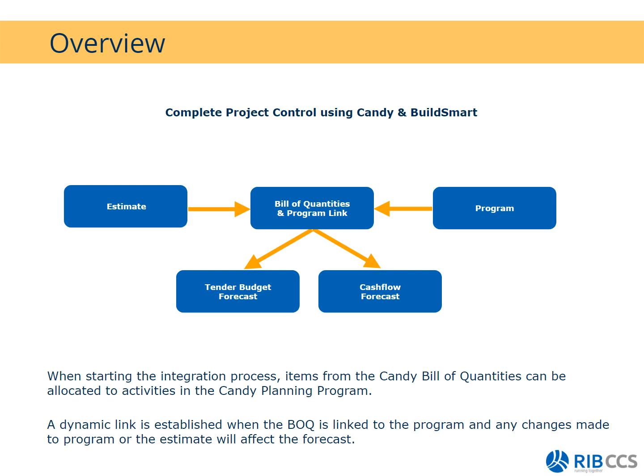I just have to point out though that on the estimate, if you go and adjust your final quantities, so let's say for Clearside, I had a total quantity of 1,000. I've adjusted my final quantity to 1,100. That means I will have an under allocation of 100. So you will just have to make sure that you go and redistribute that 100 so that the spread can be seen on screen.